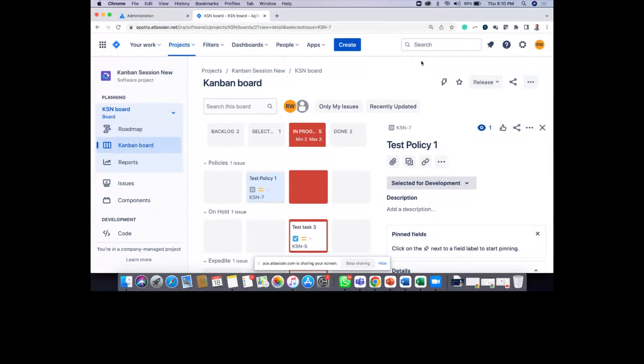In progress state. As soon as they're done, to the done state, right? Why this is important is because we want to see how long a particular ticket waits in a particular state, how long it takes to get the development done, and how long it takes for a particular ticket to be picked up by the next person in the workflow. So we want to see these things. Get your team members to update Jira as quickly as possible, right?